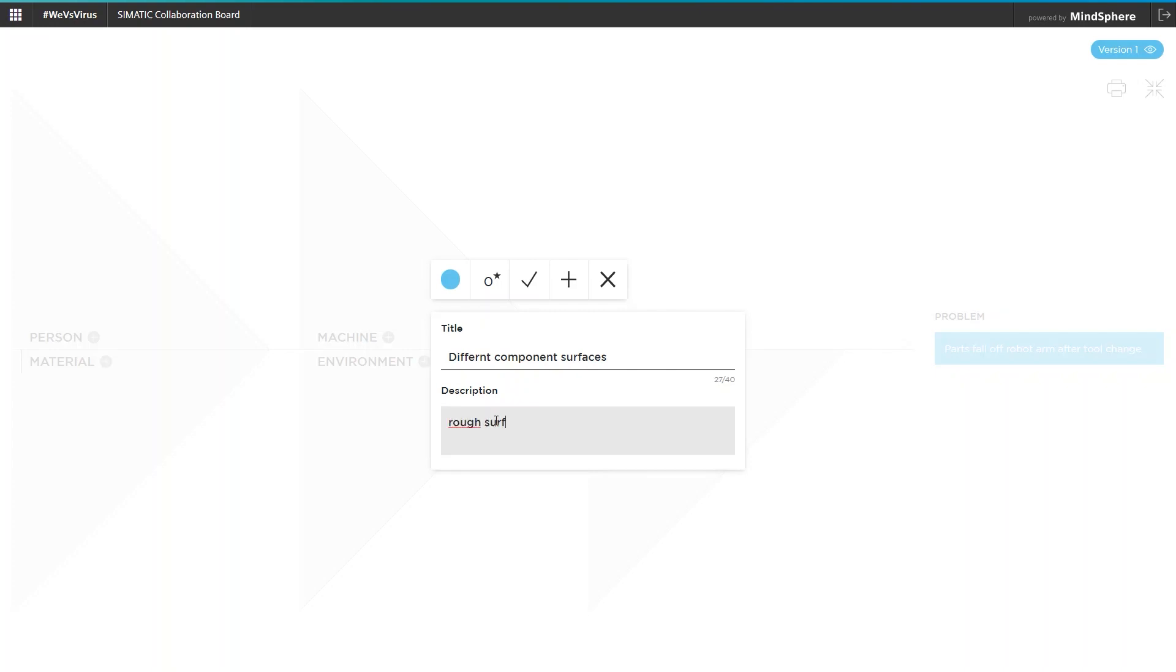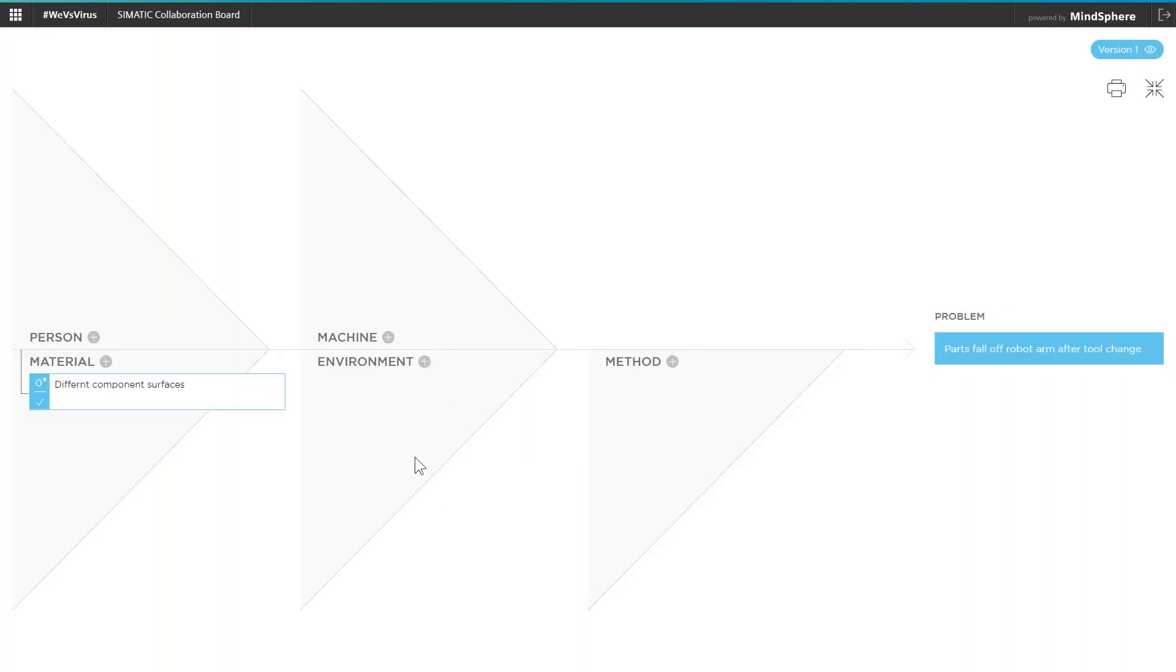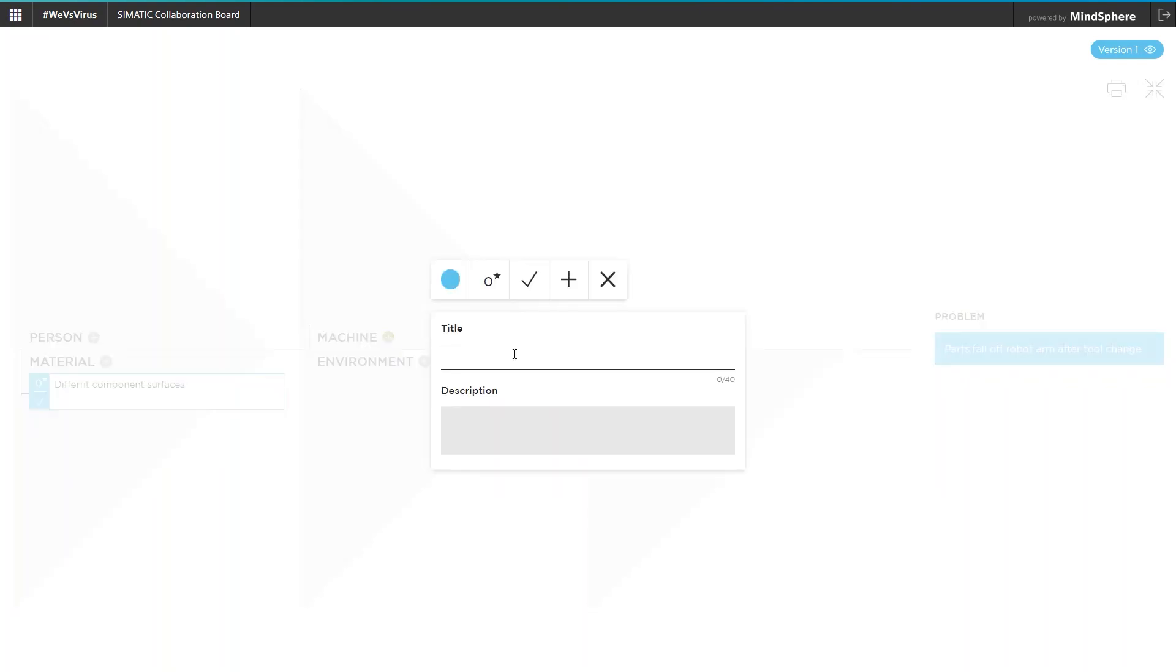This problem analysis is typically carried out by the entire project team at a later stage when there is time for it. The project members assign possible causes to each cluster and evaluate them via a star rating system how probable this cause is for the corresponding problem.